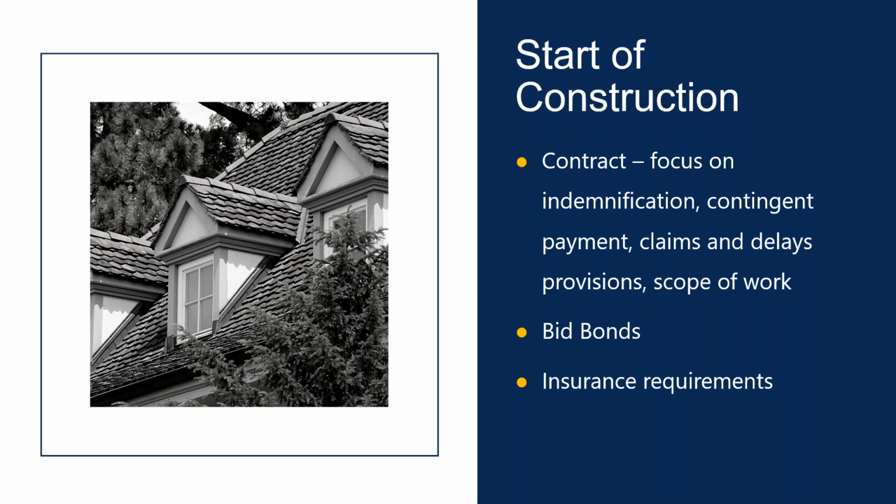Okay, indemnification, what that is in layperson's terms, is it says that in the event that you, let's say you're a roofing subcontractor, okay, if you're a subcontractor out on a job and you cause a problem, then you agree to indemnify, to basically hold harmless your customer from your bad acts or omissions, okay? Now, oftentimes in agreements, you will see indemnification provisions that go beyond that, that will require you to indemnify your customer or the owner or the architect from their bad acts, whether they're partly at fault or wholly at fault. That's what I get heartburn over.